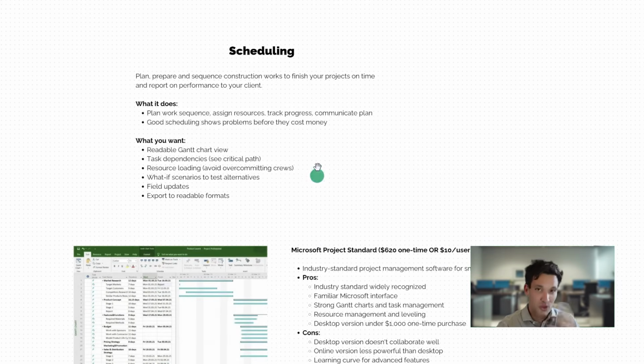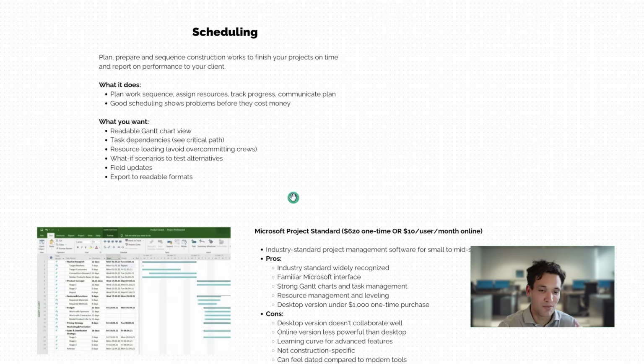That's why even if you're a small contractor, building schedules for your projects, thinking through both how you're going to deliver them, what you're relying on your client for access for, I just think is such an insanely valuable thing. And every project that I put the effort into building a schedule as part of the estimating process, I can guarantee I've picked up issues and priced it better.